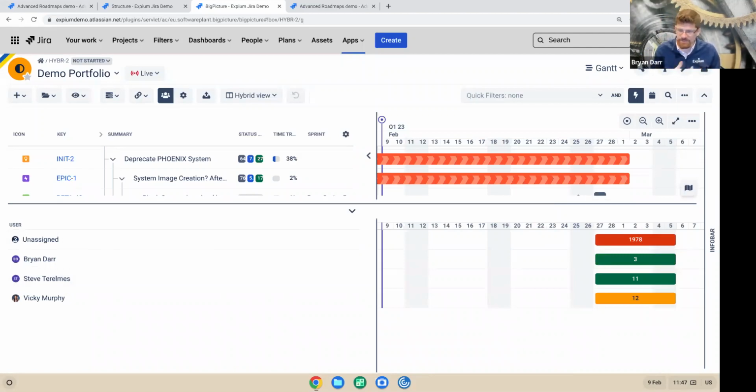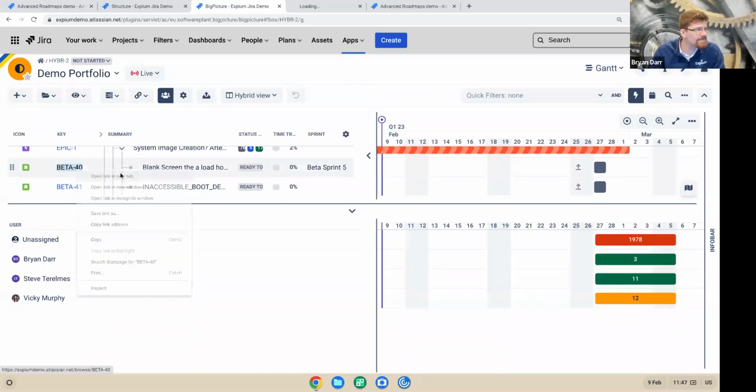This is done through shared workload plans, holiday plans, and individual absence adjustments. Capacity adjustments are done through a shared workload plan and applied to each individual. Big Picture does have skills. This is a really big piece of this tool.